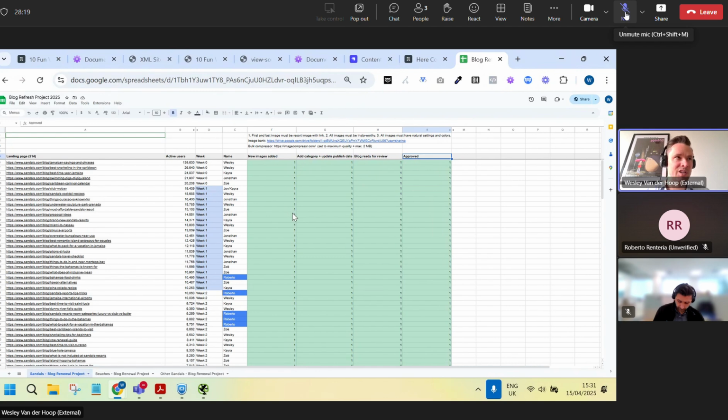I would say not more than 3 hours a day, because after that it will be a little bit crazy. So if it takes 1 hour, we can do 3 a day, divided by 40. It would take us 13 days, which is 3 working weeks.